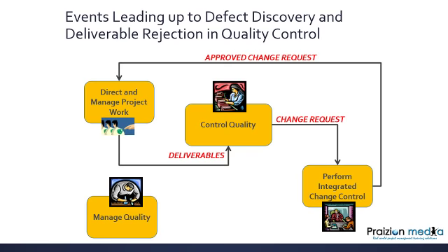So when we talk about corrective action, we're talking about activities that realign the performance of the project work with the PMP, the project management plan. When we talk about defect repair, we're talking about being intentional to modify a non-conforming deliverable, such as the one this lady just checked. So there's a bunch of things that are encapsulated in approved change request, folks. You got corrective action, preventive action, defect repair, and updates. Don't forget that. All right.